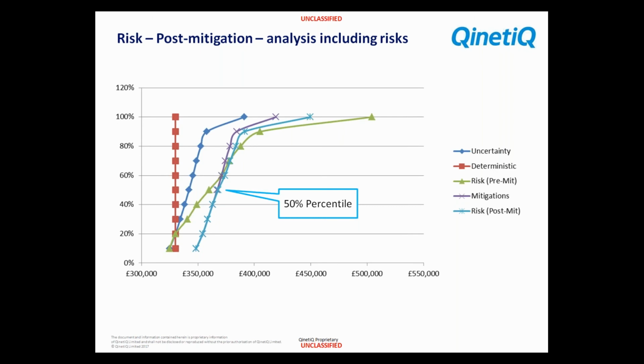They have at least some chance. Some of the projects, some of the iterations actually fell to the left of that budget. So 50-50 chance. Now this is important when we look at the end. We'll be coming back to this. But just bear in mind that 50th percentile represents half of those projects, half of those simulations falling above and half below that number.